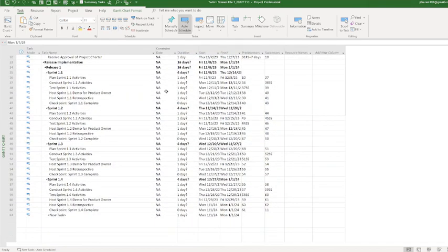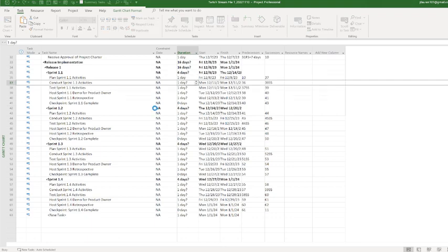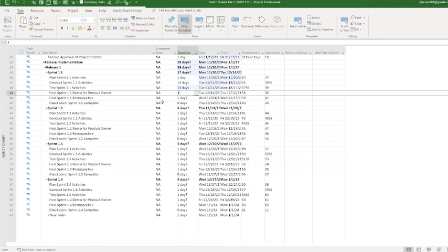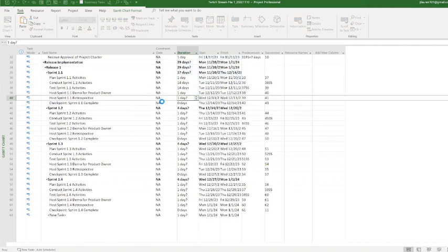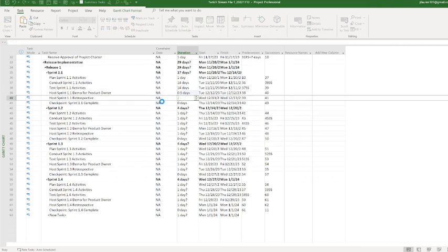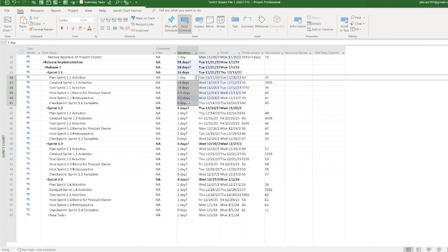And this is going to be another fun part. So sprint planning should take a day. A typical sprint takes 2 weeks. So you can do a demo in a half a day and that in a half a day. Now watch this. Copy.